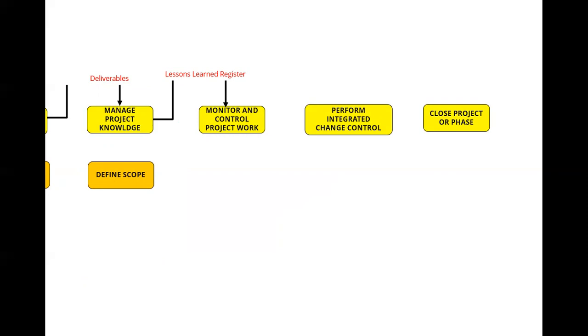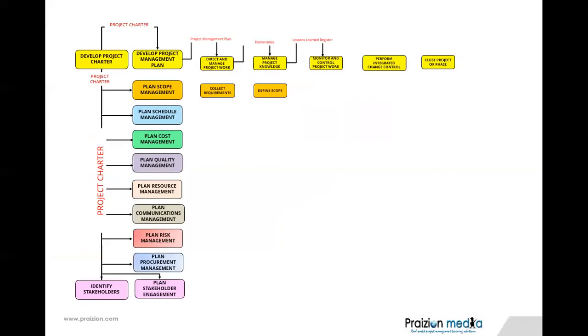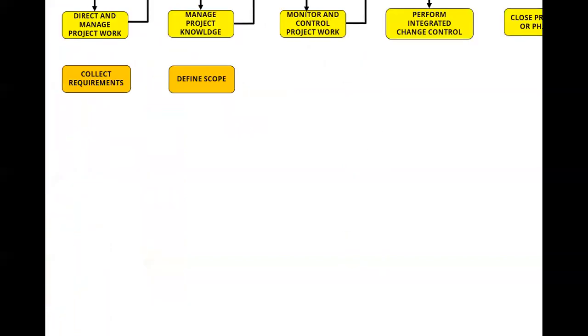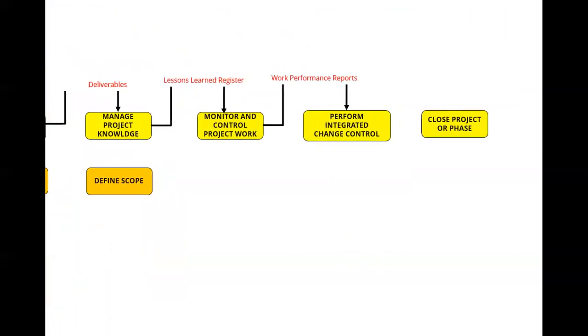Let's take a look at another relationship here. So from monitor and control project work, did it occur to you that there is a relationship here as well? In that, work performance reports come out of monitor and control project work and go into performing a greater change control. Again, you need to know why. But that relationship also exists.